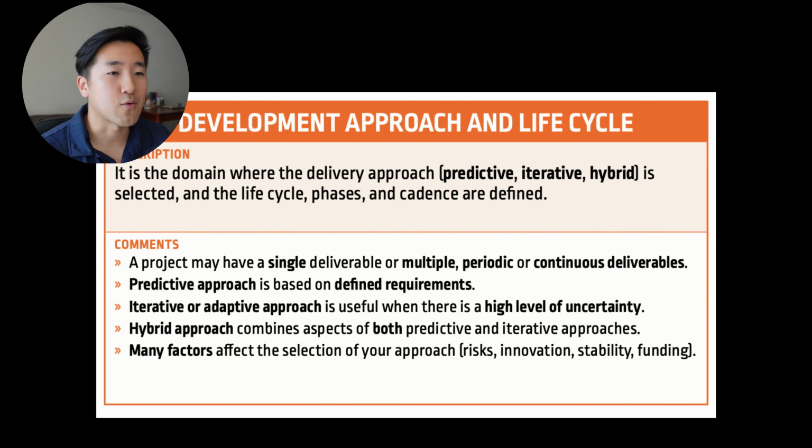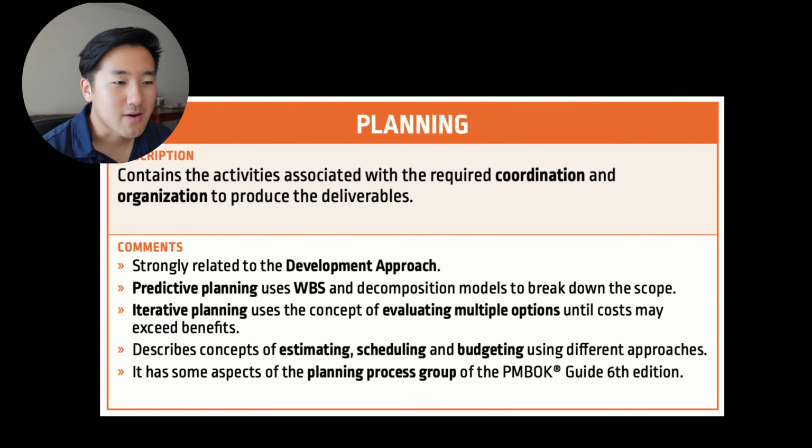If you're building out software, things are changing, you're building out new features for a new client, you'll probably want to use an iterative approach, which basically means you're building for a short period of time, you're testing it, you're getting feedback from the client, and then you continue that process until the end product is something the customer will accept. And then somewhere between, there's a hybrid approach, and that's where a lot of projects fall. Think about which one makes the most sense for your project, and use that framework as a good foundation to build off of. Planning is very important for every project.